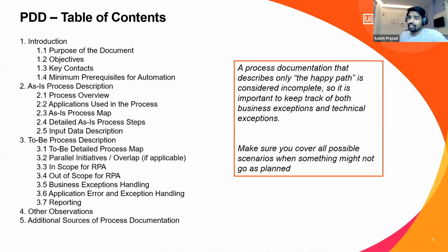And if you consider all of these things, especially the business exception handling and application error handling, you are good to go. And make sure you document everything. When I say everything, that means every single click of a button has to be documented, right? So you have to be very careful while designing a PDD, and get a sign off from the business user before the start of development. Because I have seen many times when the PDD has been signed off, and after 7 days, a business owner will come and say, look, you are automating this step, but there is a person who has special privileges.